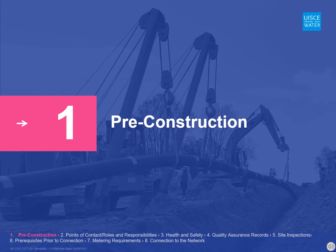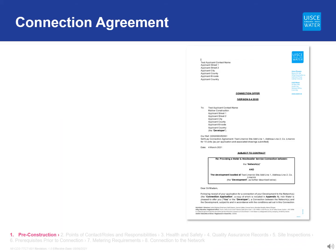This chapter summarises what must be in place before the construction of water services on self-laid developments begins. The connection agreement is a legal contract between Irish Water and the developer. It calls out the quality assurance process set out in the Irish Water technical documents, and records the design of the pipework which has been agreed with Irish Water as part of the connection application process. There should be no changes to the approved design without prior approval from Irish Water.